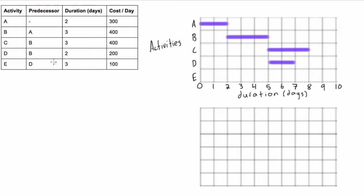Then let's look here, activity E depends on D and it is three days long, so we're going to start here and go right till the 10th day, the end of the 10th day like that.